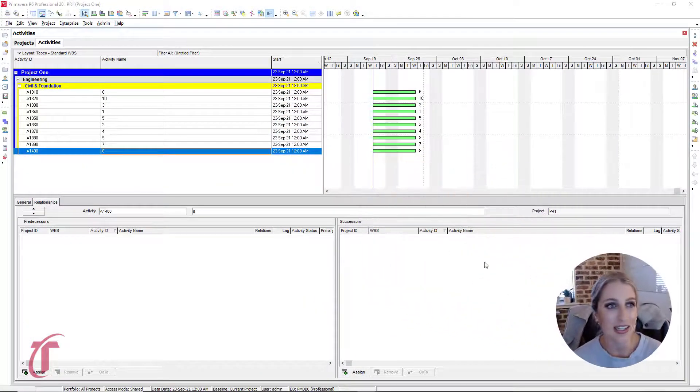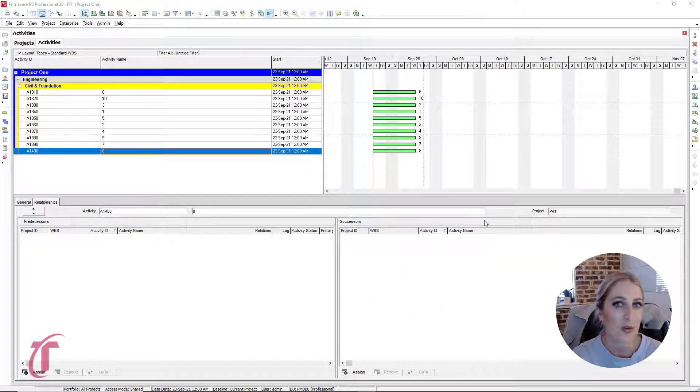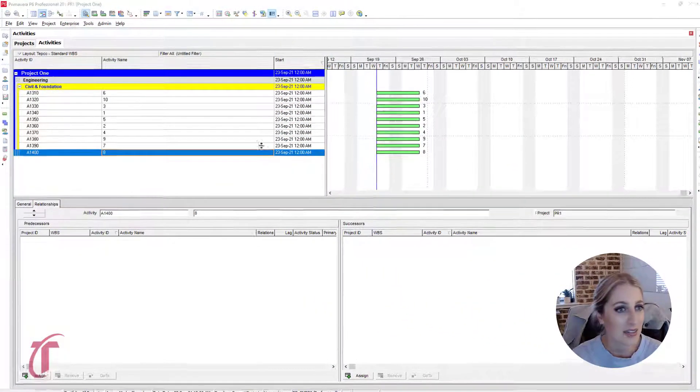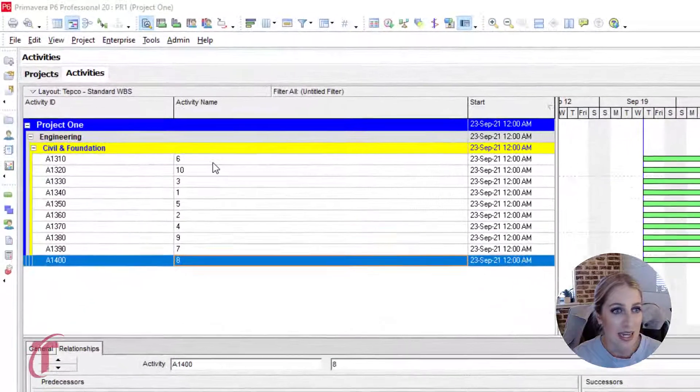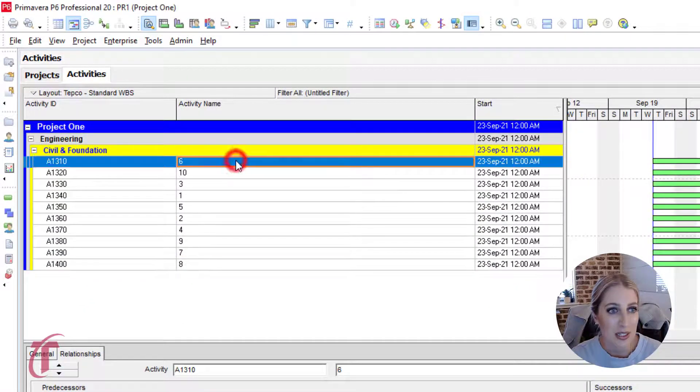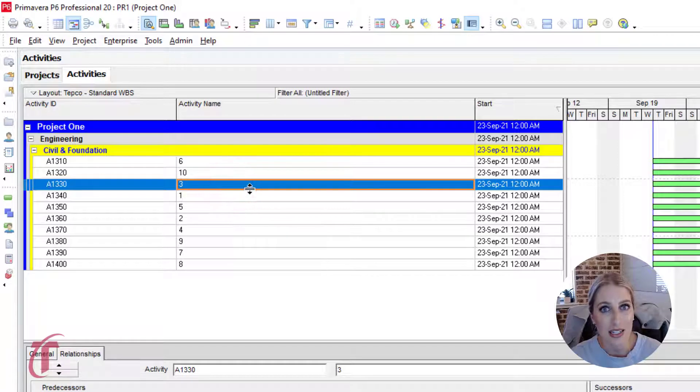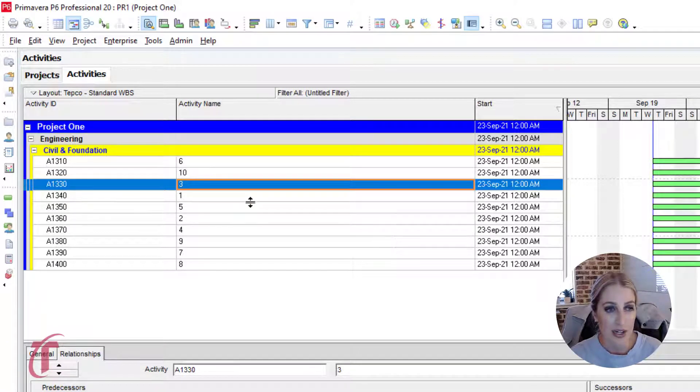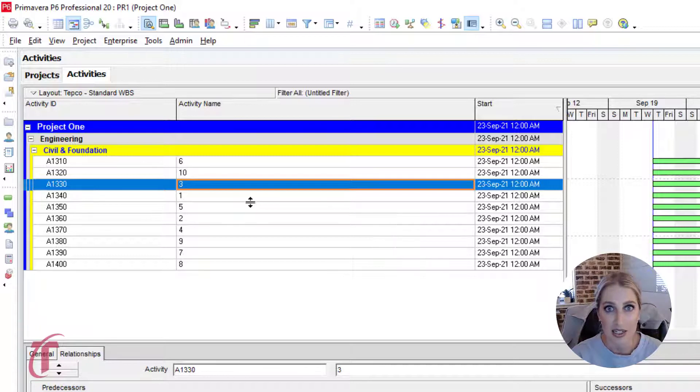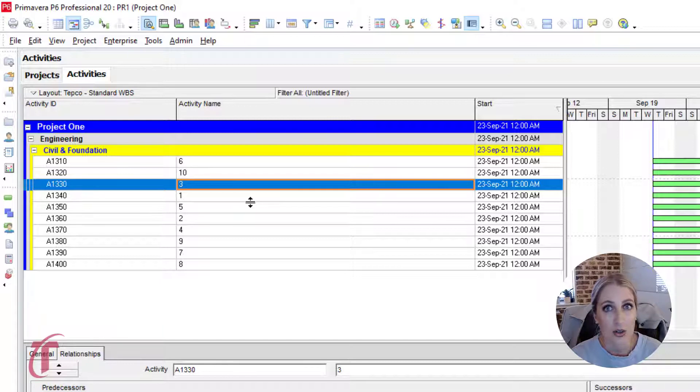So looking at the screen that we have here, we have 10 activities that have been added in, but notice by our numbers that we do not have these in sequential order. So in those cases where you need to link activities and tie logic but they're not in order, what we can utilize is our control key.